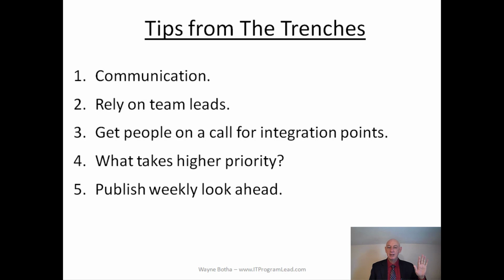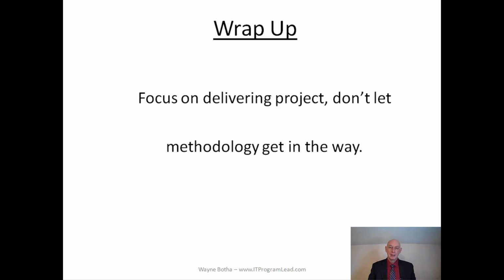Tip number 5, publish a weekly look ahead email. With all the communications that happen in a large company, it's easy to forget what the exact details are for the upcoming week. My team leads have told me that it's very helpful to get an email on Friday which simply outlines the top 3 priorities for the following week and the top 3 priorities for the week after that.